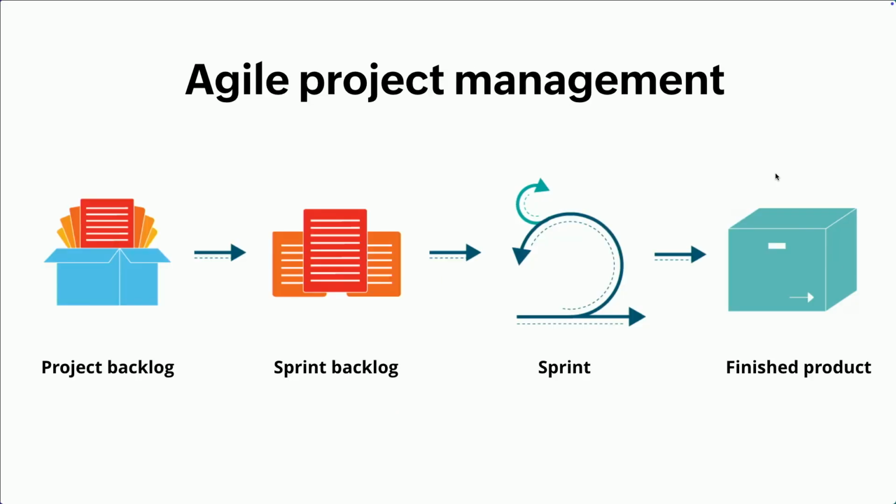The core of sprints, if the waterfall project methodology is the core of projects, taking big pieces, breaking them into small things that you work on until the bigger thing is completed, this is the core of agile project management. So you have a project backlog. Backlog is made of several different types of tasks, but they're all tasks. Leave it at that until I show you the product. And then you take those things and you put them in what's called a sprint, building a sprint backlog.